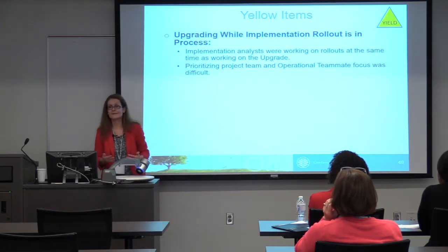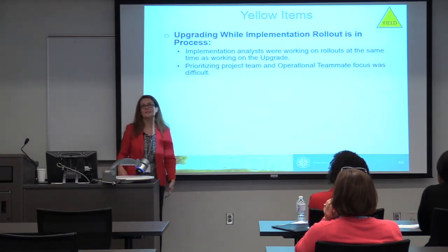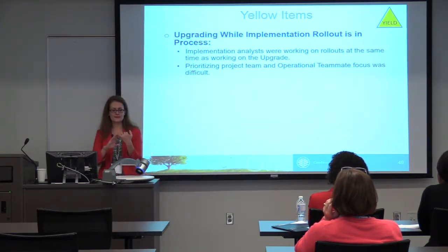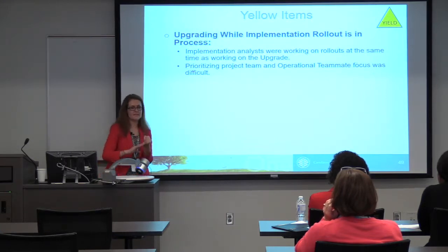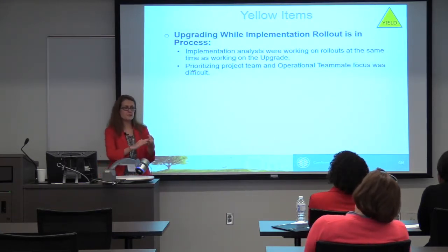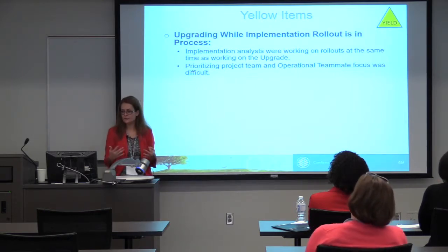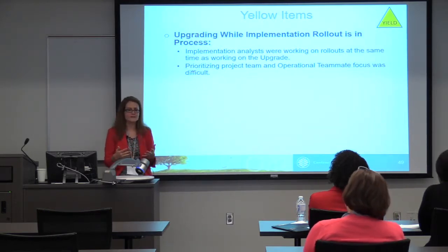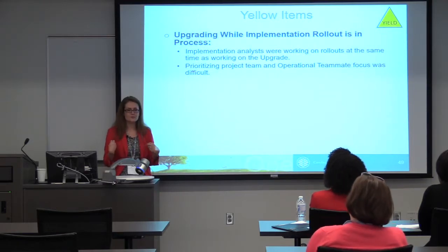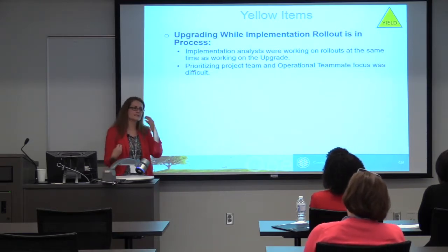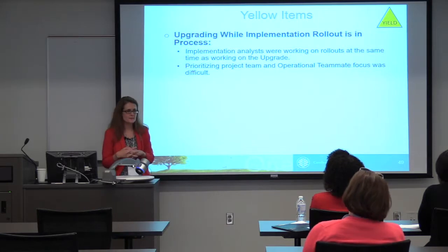I can't focus on the upgrade right now because we're having a major prod issue. So not only were our analysts focusing on the next implementation and the upgrade, but we had production issues and day-to-day maintenance that we had to do. It was very difficult for us to pull all of those hours that we needed out of these resources that were pretty much tapped out.